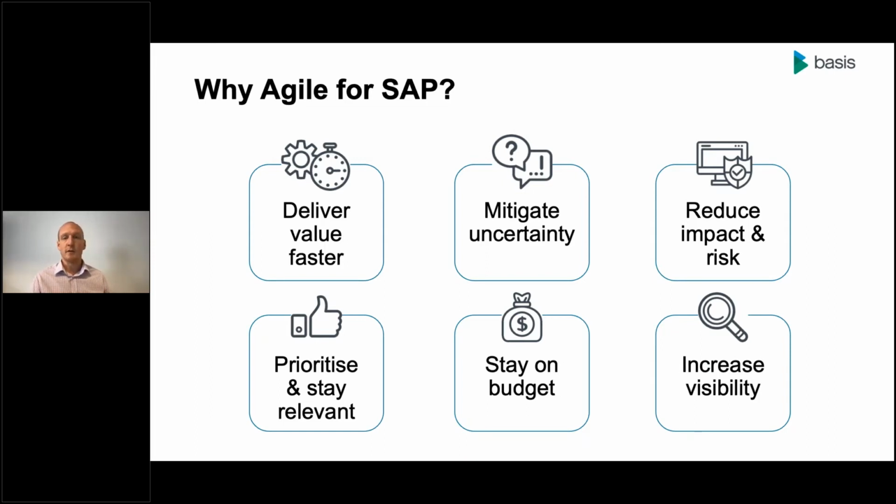Again, Agile should help us to get a better idea of spend and how we're staying on budget. And again, this is probably more relevant to that project scenario, to the bigger pieces of work. But as we're going along and delivering discrete units from end to end, we can see what we've invested in those incrementally as we go along, rather than having to wait for entire phases of project work to be completed and for that change to be delivered before we can really see what the cost and the impact was.